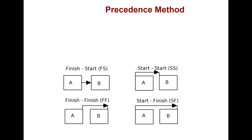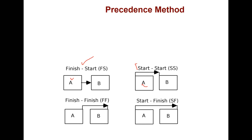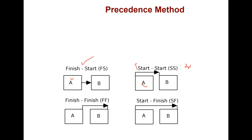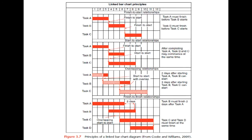The most common activity relationship is finish-to-start, meaning the preceding activity A must finish before activity B starts. Another common one is start-to-start — once work on activity A has started, work on B can start simultaneously, sometimes with a time lag (e.g., two weeks). There is also a finish-to-finish relationship where the finish of two activities are tied. Start-to-finish relationships are not common.